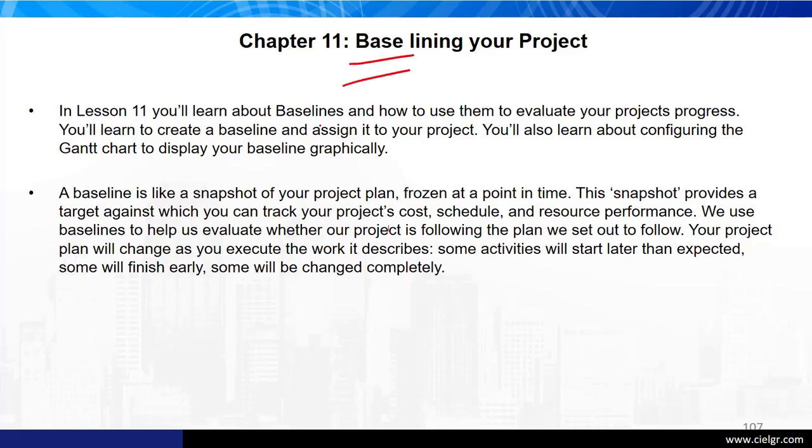So baselining your project is actually a very interesting feature and a very important one at that, because if you do not baseline your project, you might not be able to do your project analysis. I mean, when we're going to begin to talk about earned value management, the tracking of our project, and some of those other details, all of these will stem from the fact that we have baselined our project.